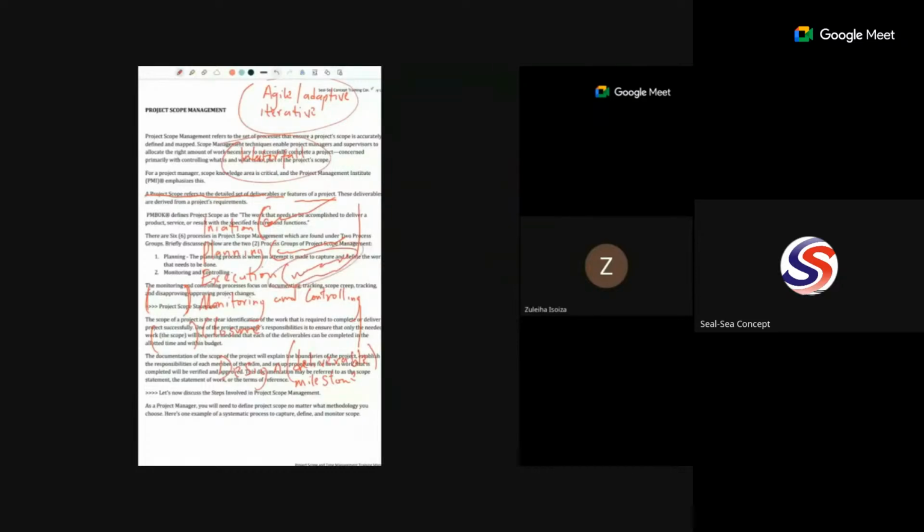And then you take the design to the customer so that you can carry out the monitoring and controlling. If the customer says, oh, look at this design, I want you to reflect this kind of changes, what do we call that? We call that a change request in project management. So the person is now requesting that, oh, instead of this room being in this place, I want the first place I will enter to be a room rather than entering the sitting room first.